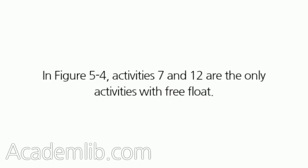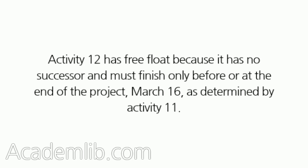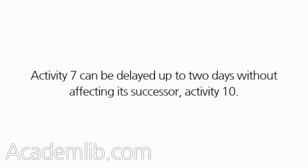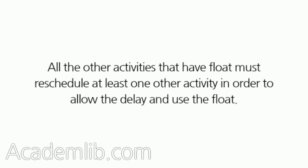In Figure 5-4, Activities 7 and 12 are the only activities with free float. Activity 12 has free float because it has no successor and must finish only before or at the end of the project, March 16, as determined by Activity 11. Activity 7 can be delayed up to 2 days without affecting its successor, Activity 10. All the other activities that have float must reschedule at least one other activity in order to allow the delay and use the float.